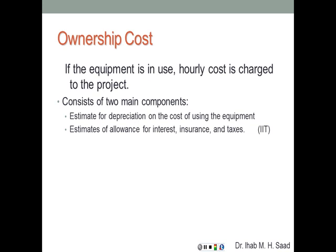The ownership cost consists of two main components: estimates for depreciation on the cost of using the equipment, and estimates for allowance for interest, insurance, and taxes. This is by the definition of the CII — the Construction Industry Institute. There's also the dilemma of how much to charge the owner: charging at rental price may increase profit but could make the total bid too high to remain competitive.